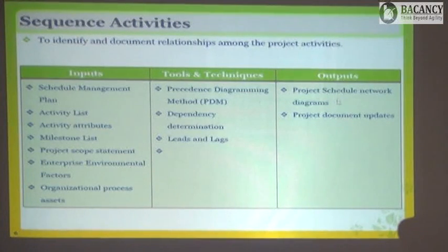Suppose, I'll give you an example from construction. You have constructed this room, the plaster is done. The next activity is to color the walls. Now between plaster and color, you need to give some time for the cement to dry, be it 1 day or 2 days, let's say 2 days.